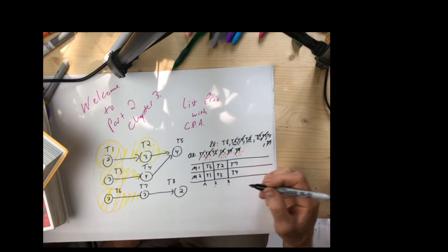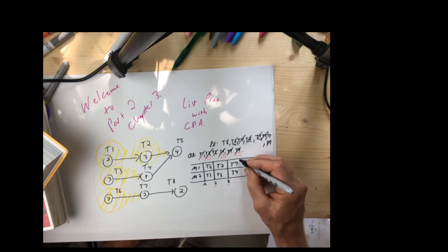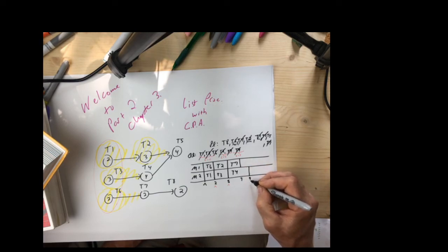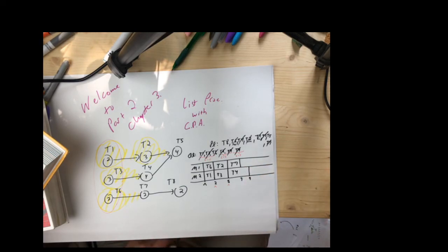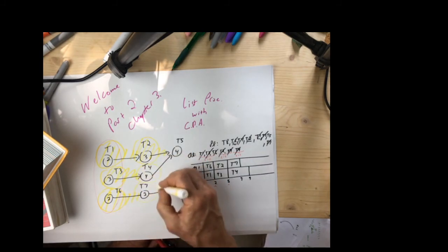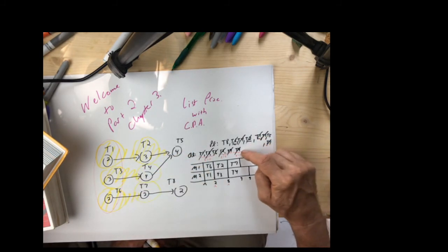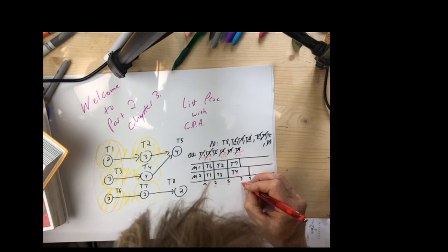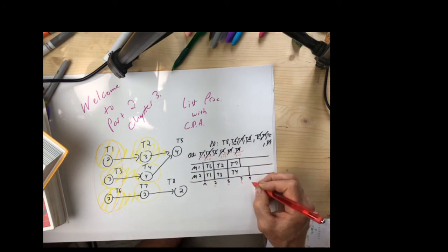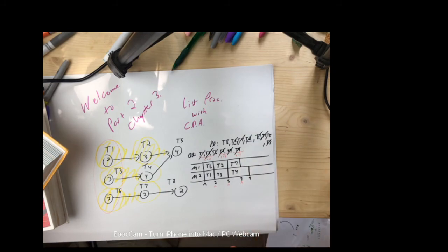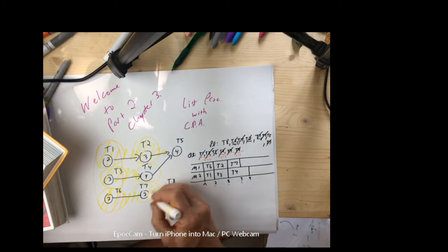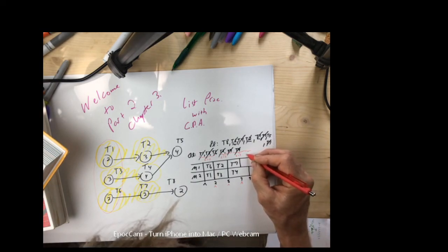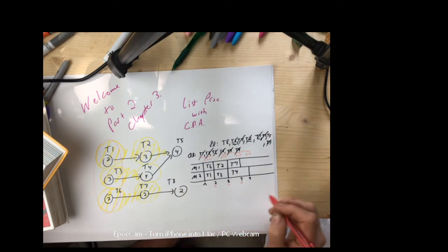Now, T4 runs for 4, and T7 runs for 2. So now, this is at 7 up there and 9 here. And it just got slightly interesting. So, updated, updated, updated, updated. And now we move the time marker forward. And now the time marker hits 7 before 9. So at time equals 7, T7 finished. And so at t equals 7, T8 becomes available.